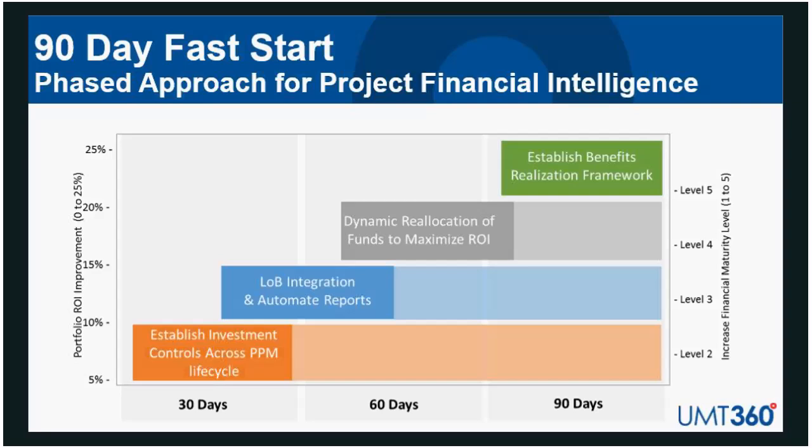during the life cycle of a project, the project managers may need more money, or they may give some money back, and this free pool of money then can be redistributed to other projects that would not make the budget cut. Or potentially, if you see a project that is not performing well, you can take the money from that project and reallocate it to a project that would deliver a higher return on investment.